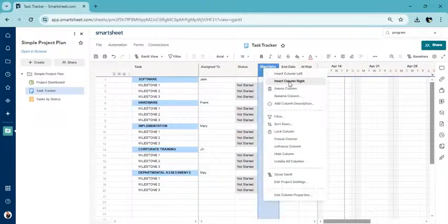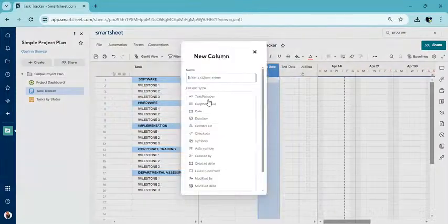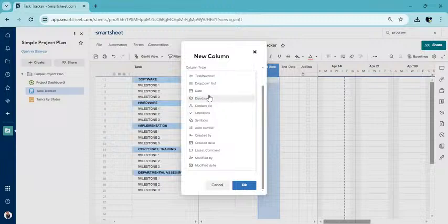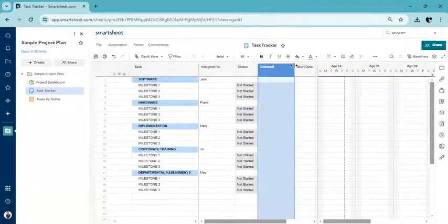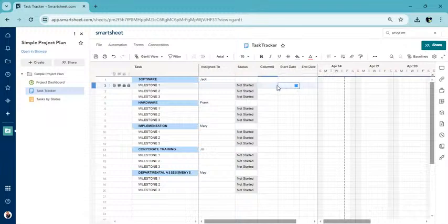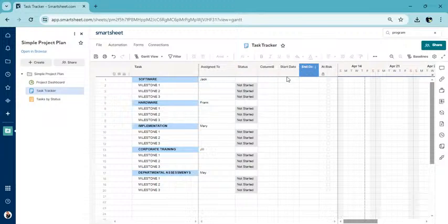You also want to have in here, let's insert a column, the duration. This is in the spirit of good scheduling, right? Just have the duration in there. So milestones are generally zero duration, okay? So these will all be zero duration events. But if you wanted to track the entire work leading to the milestone, you could make an exception and you could decide to indicate how long each endeavor will take at the sub-level, okay?